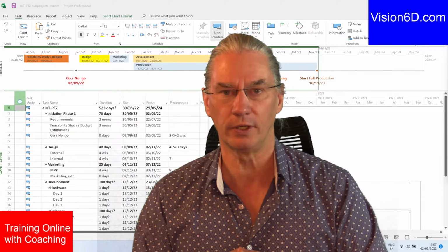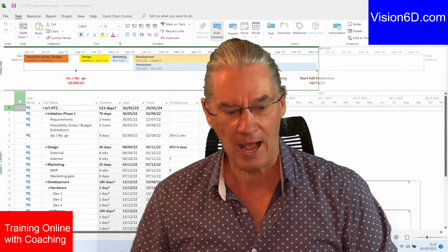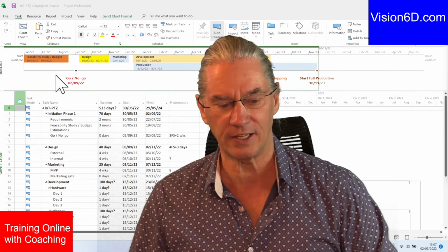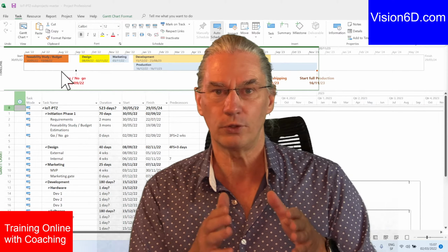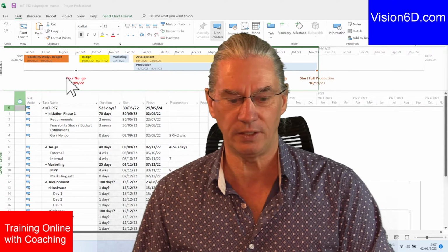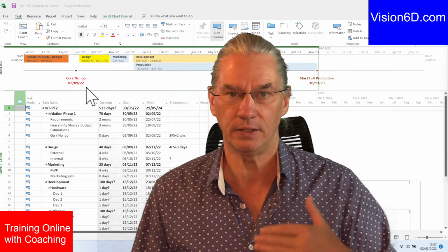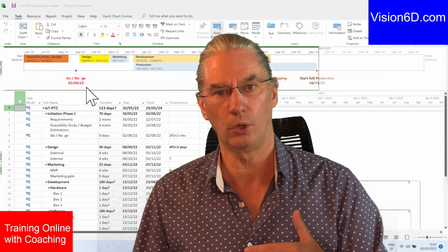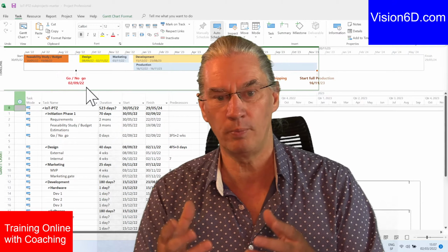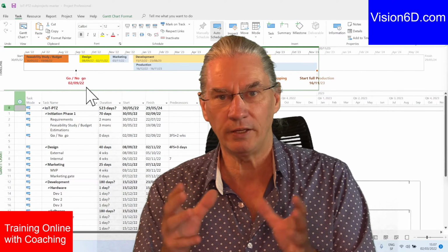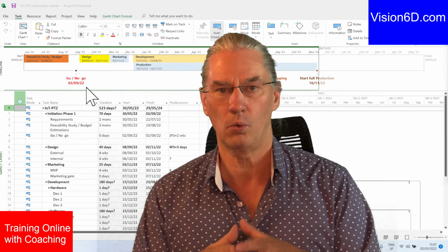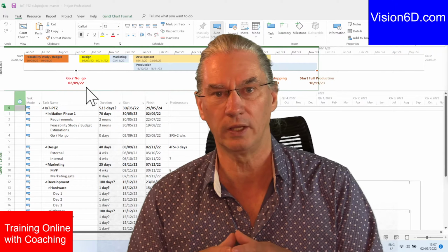Before we arrive at the development phase, if I may ask you to look at the timeline behind me. You see here in that orange-brown, we first started with a feasibility study. Once the feasibility study was done, we made a decision whether to go or not to go onto this project, because we got feedback on how much the investment would be, the kind of revenues we could expect, and there was the decision whether to move ahead or not with the investment.